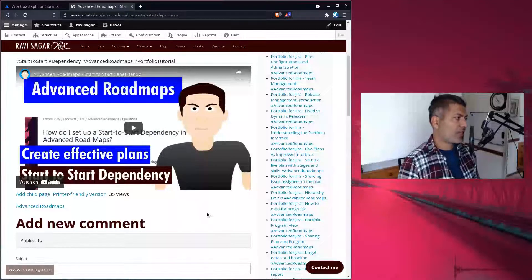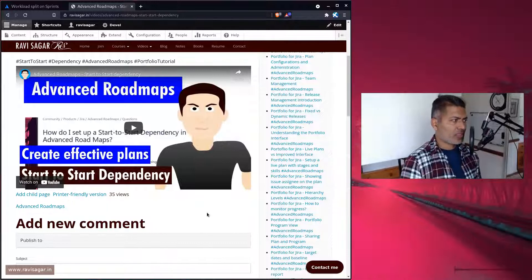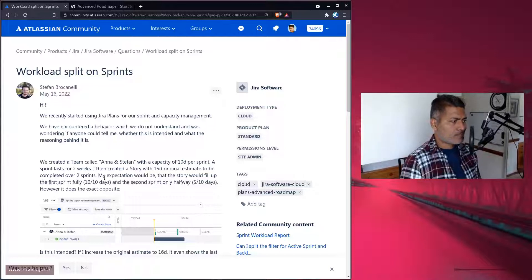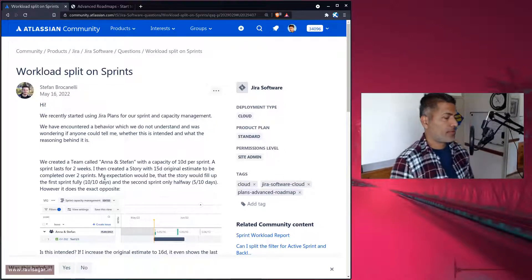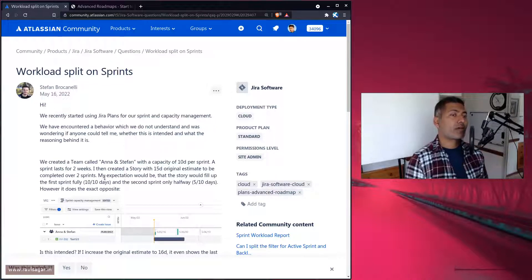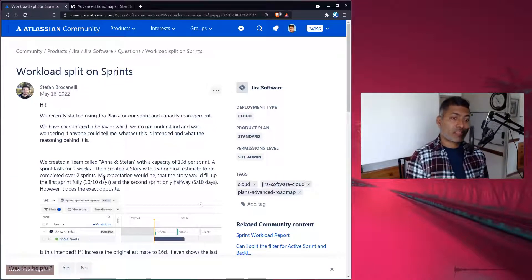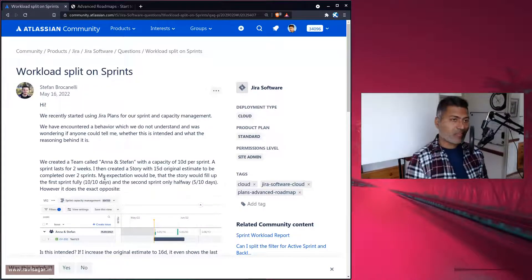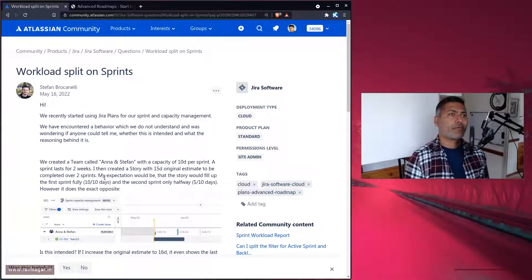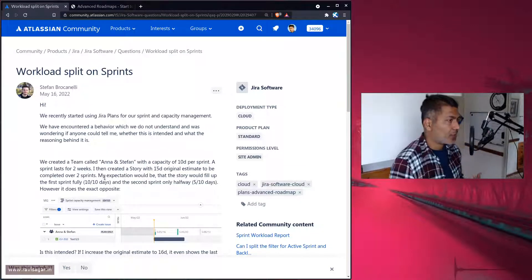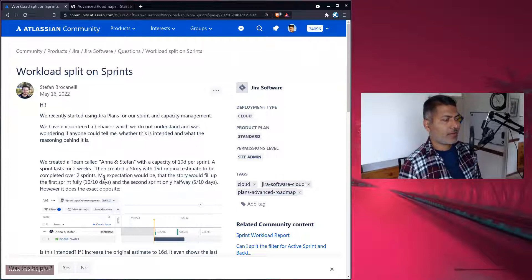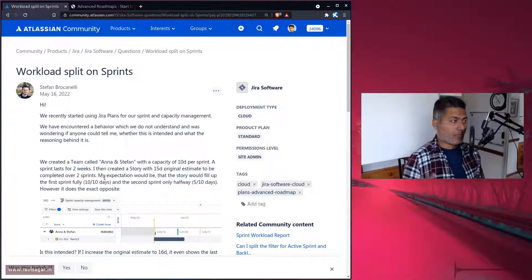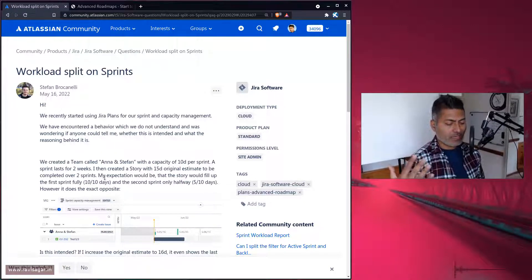What I also wanted to say is that if you're making a plan using advanced roadmap, you don't have to just use it as-is. That is a great thing, because advanced roadmap will create a plan and basically suggest that these stories can be delivered in these sprints — but you're free to accept or commit those changes back to your project. And even after making a plan, you can still do some adjustments yourself based on your specific needs.